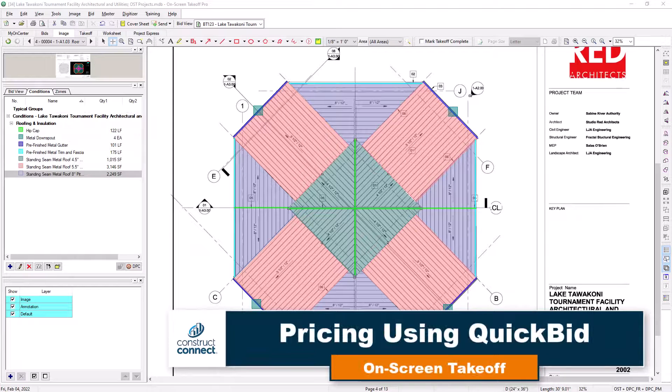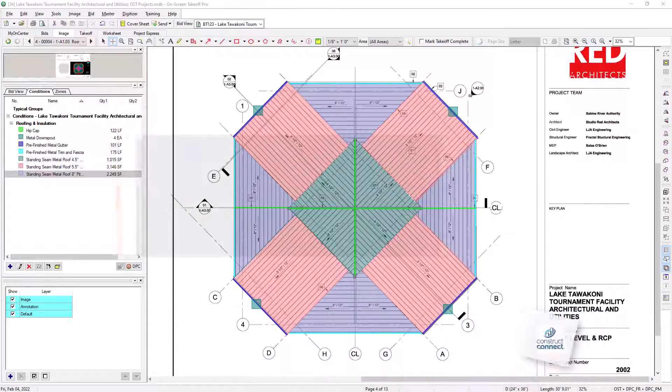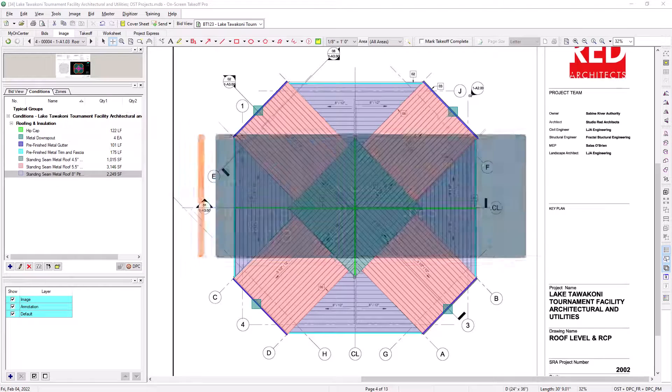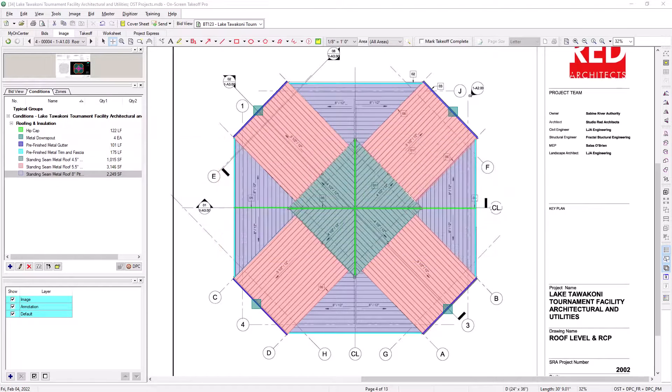If you are using the QuickBid estimating software in tandem with On-Screen Takeoff, you need to make sure that the takeoff numbers you generate in On-Screen Takeoff are sent over to QuickBid. Within On-Screen Takeoff, this can be done in two ways.